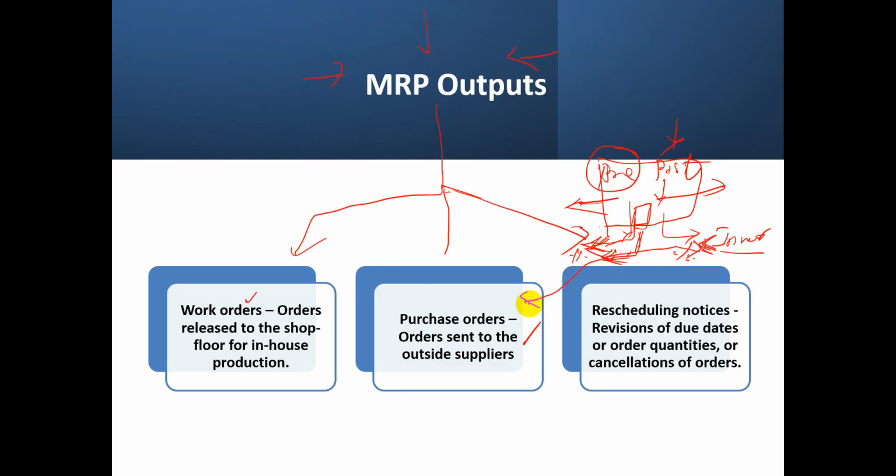He can immediately take the information from PPC and inform the suppliers, so that suppliers won't deliver materials for a project already postponed by the customer. So that material will not come into the factory unless we give acceptance for delivery, so that inventory carrying cost will be minimized.